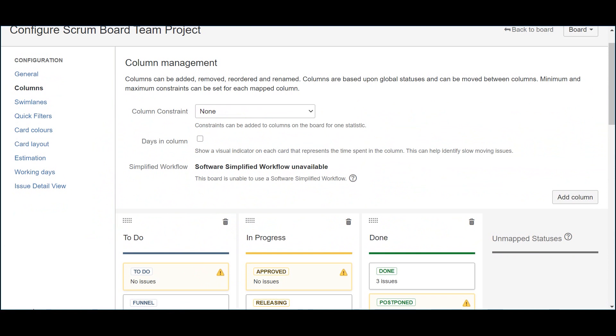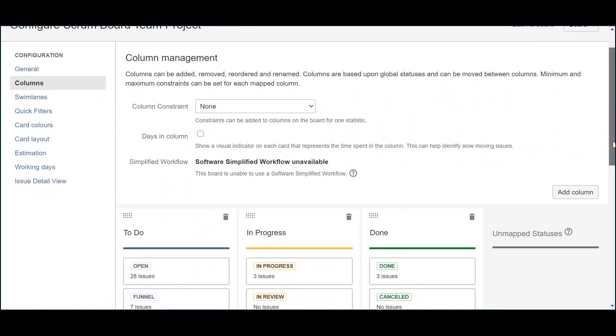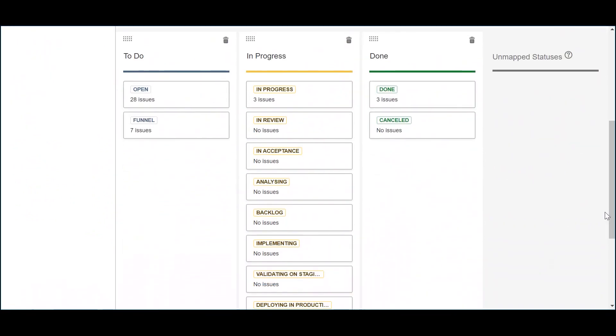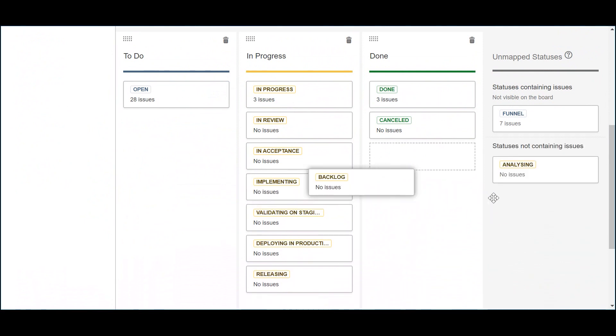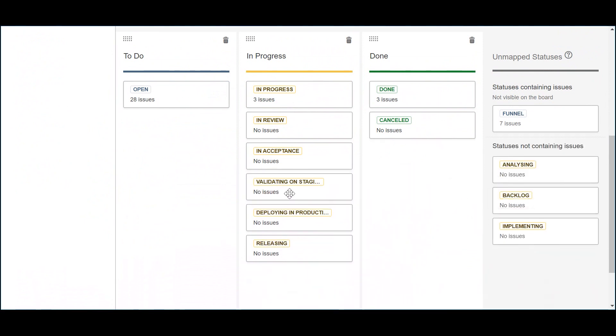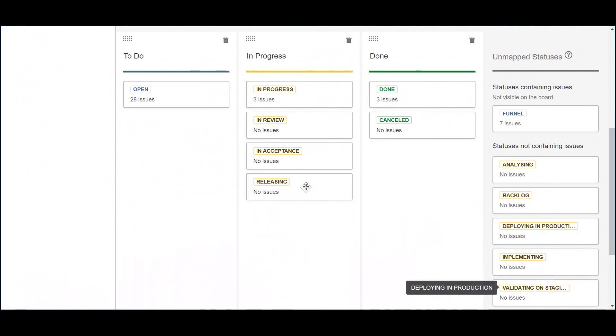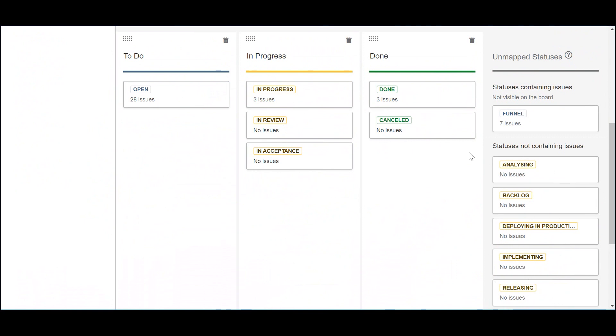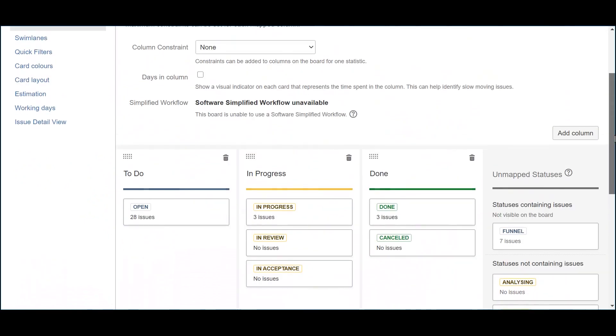The next step is to configure the columns that will be part of the Kanban board available in the active sprint section. The first thing that you need to bear in mind is that the columns are a more intuitive way of visualizing and updating the progress of the several items that the team needs to deliver. It's very important to ensure consistency while creating the columns, since it's there that the different statuses of the workflows will be mapped. So, let's start by removing the statuses that belong exclusively to the epic and put them in an unused status column. These are Funnel, Analyzing, Backlog, Implementing, Validating on Staging, Deploying in Production and Releasing.